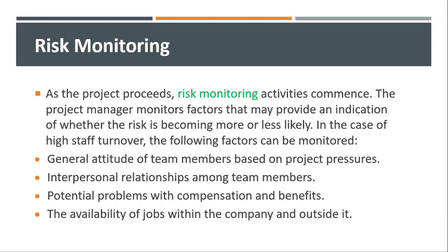The project manager monitors the factors that may provide an indication of whether the risk is becoming more or less likely. In this case, we are not monitoring the progress of the project. We are monitoring the risk, whether the risk is becoming more or less likely.